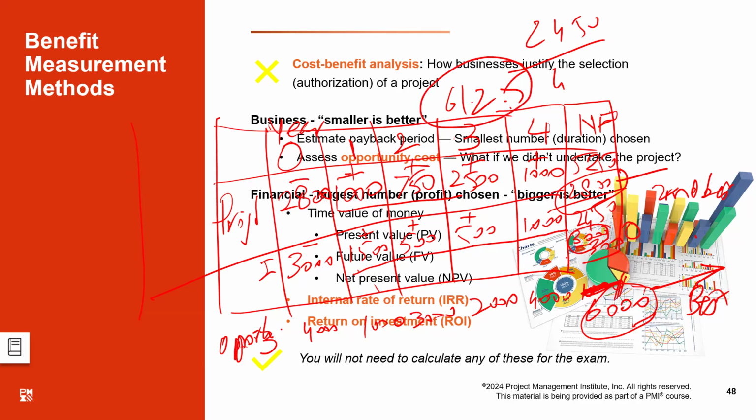How much is it in percentage as compared to my investment? We need a calculator. If I divide 612.5 by 2,800, that was the investment, it is 0.21875. Multiply it by 100, it will be almost 22%. So your ROI of this project is 22%.